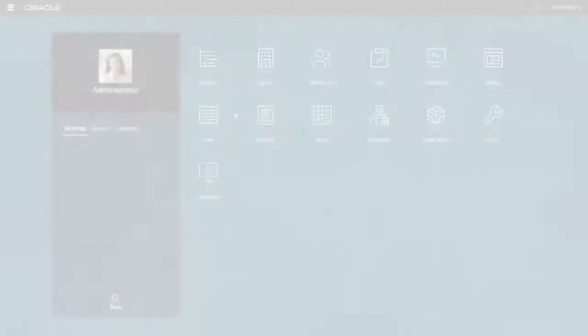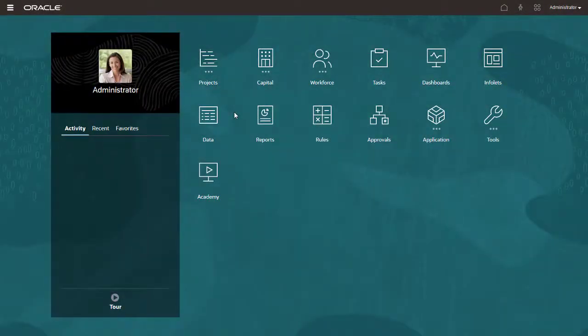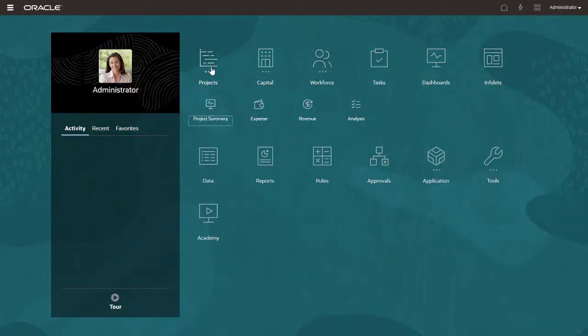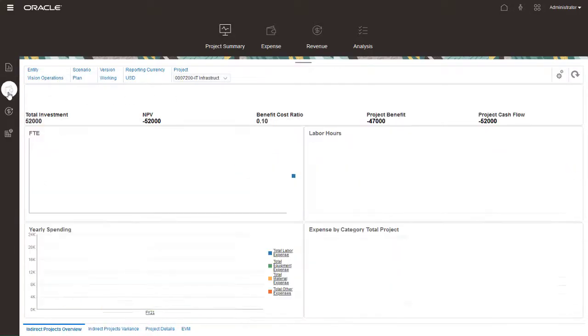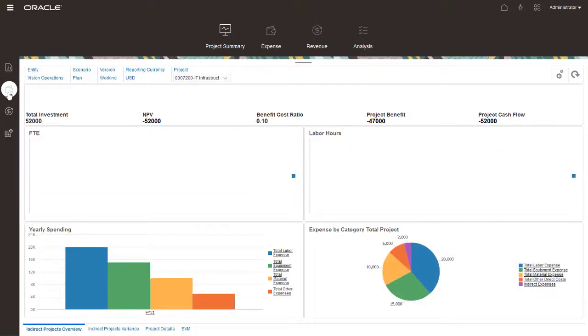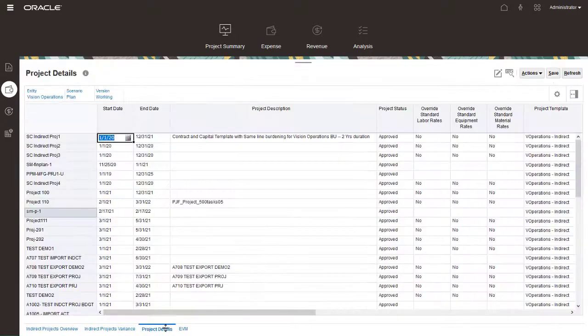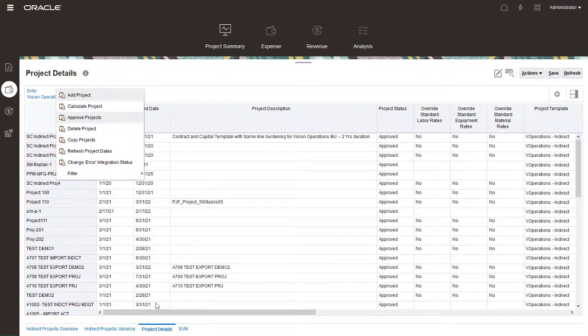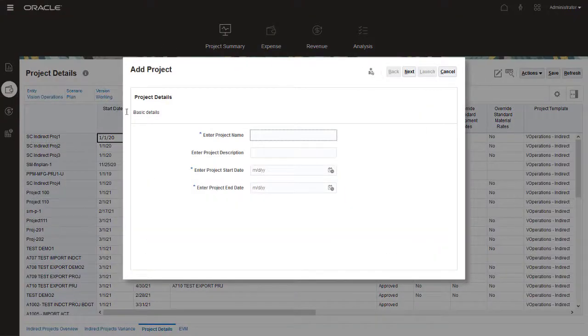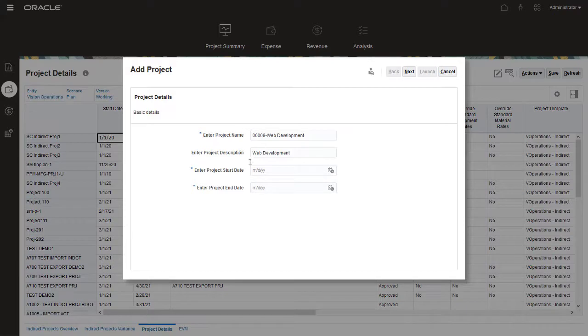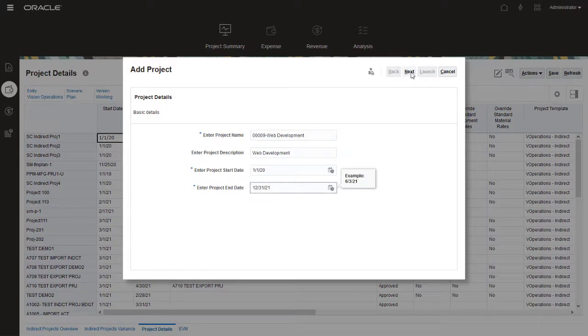Let's start by adding an indirect project. In EPM Planning, open the Project Summary page and select the Indirect tab. On the Project Details tab, right-click and select Add Project. Enter a project name, optional description, and a start and end date. Click Next to continue.